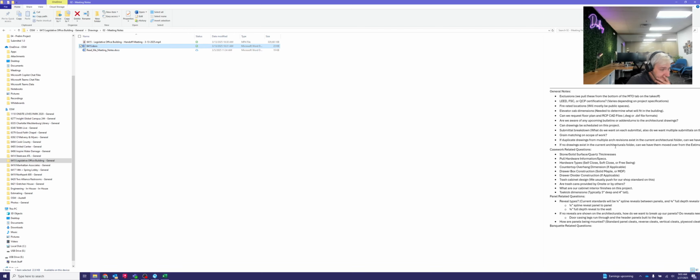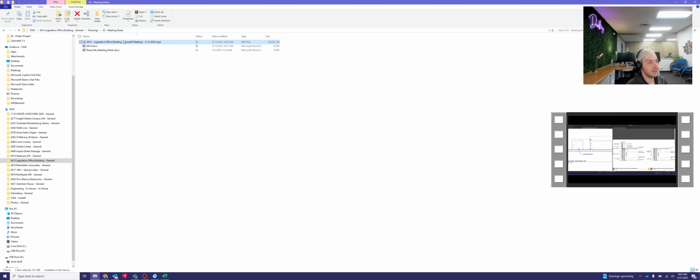Anyway, aside from all that, after you've reviewed the takeoff, the architectural drawings, the material log, you'll want to come to this folder here and take a look at these notes and take a look at the handoff meeting recording and just breeze through that, give it a listen, try to see if there's any notes that apply to the drawing you're working on. And if there are, write them down. Make sure that you have your list at your desk of the different things that you need to make sure you cover for the project or for the drawing you're working on.